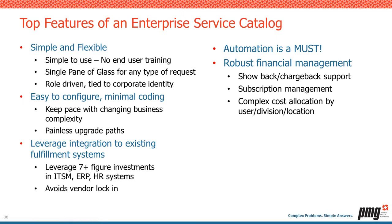How long did the initial implementation take? In totality, it was about 6 months. We would have done it in 2 to 3 months, but we kind of stopped and took a step back. Initially, we were going after a United States only based deployment, and then we got a lot of feedback of don't trickle this out like we may have done in the past, start in the U.S. and move to Europe and eventually Asia. That really, to be successful, we should do worldwide day one. So that obviously took more time. In the end, it was nearly 6 months, but it was time well spent to make it available to all employees, literally at the same time. Much bigger impact.